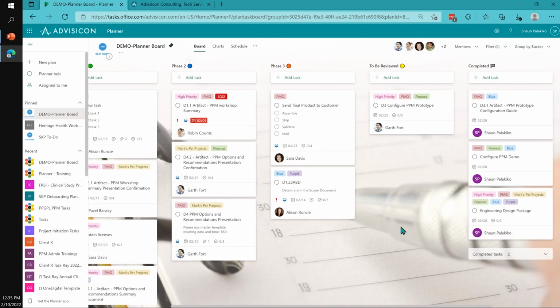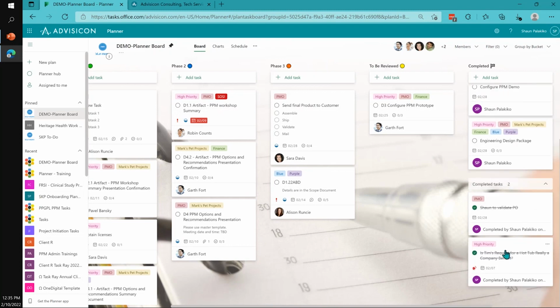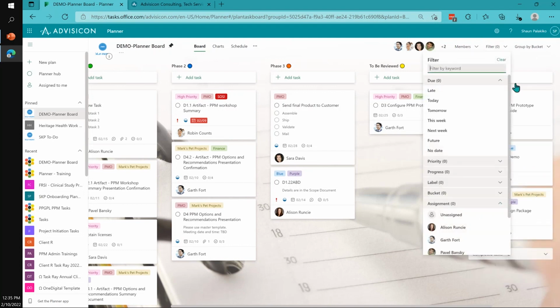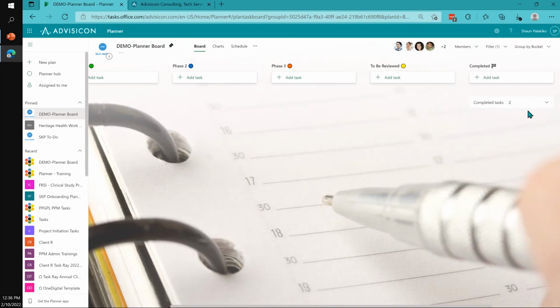As a retrospective or lessons learned, you can come back and sit with your team and say, all right, what have we got done this week? Okay, well, let's have a discussion about this one. What was good? What can we learn from this? Let's have a discussion about this one. What was challenging? What can we do better next time? So that organization level is so useful. And I would say, let's look at all the completed tasks. Now you just look at what's been done.